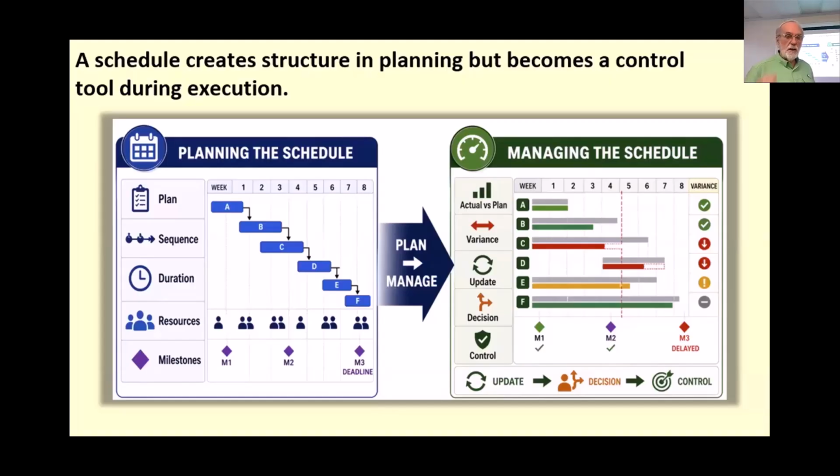action is needed. The process groups, the practice guide book that we have, helps reinforce this by separating the planning processes, such as plan schedule management, define activities, sequence activities, estimate activity durations, and develop schedule. All of those are planning activities. From the monitor and control part of it is control schedule, which is really the execution part of the schedule. So most of the schedule management we've done up to now has been all planning,